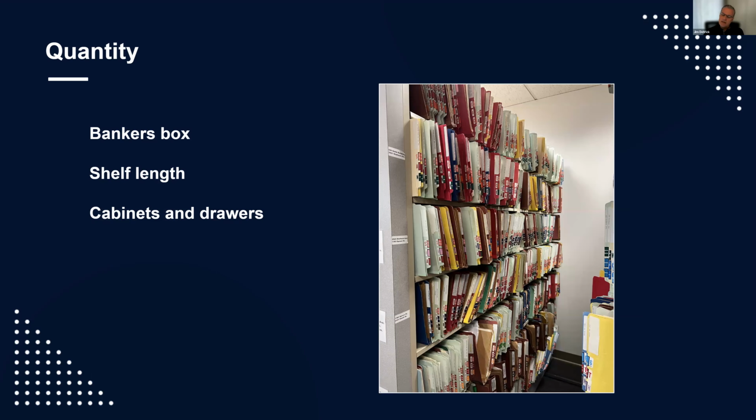This is a shelving unit. Some of you may be familiar with these for high density type of shelving storage of files. So these shelves roll. This is another on-site discovery picture that I took just a couple weeks ago. There are approximately 6 feet worth of files from front to back to the wall there, and 7 shelves per section, and there were 10 sections. So we encounter this quite a bit, and these would all need to be transitioned to boxes for scanning.